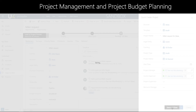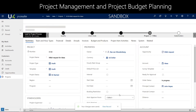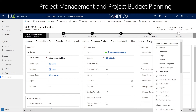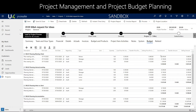The project template is now converted into the work plan of our project. All the information is inherited from the opportunity and the stage of the opportunity is now finalized. We can directly go into the project details and find out about our budget. A budget is allocated of $9,520. Connected to a work breakdown structure is our budget template, where you can define the standard of your work processes and procedures that you offer to your customer.